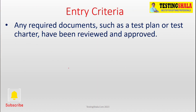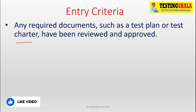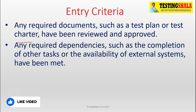The next entry criteria is that the test plan, test strategy, and test charter need to be reviewed and approved. These are reviewed by various stakeholders including the development team, development manager, business analyst, product owner, and architects. They review the overall testing approach, resourcing, and estimation. Only after their approval can we start testing. Any external dependencies also need to be resolved.